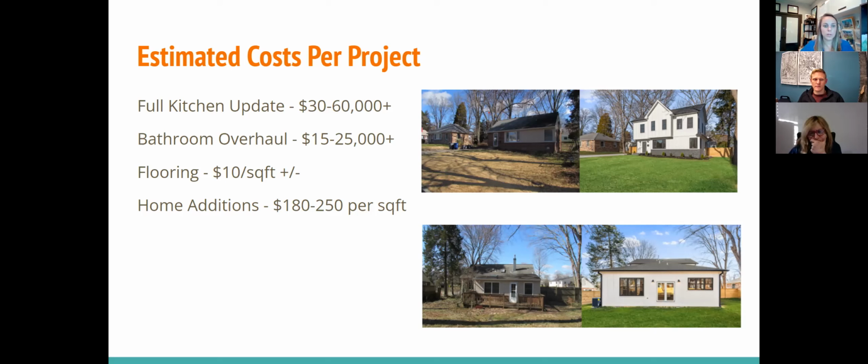One other price I didn't put in there: interior renovations can run about $100 to $150 a square foot for just the interior full overhaul pricing. These are very general numbers, just to have something to work with. But excuse me, if you guys want something more specific, we have some more detailed pricing for what we charge and what we tell people to expect from any other builder out there or GC who's going to be running the entire project.